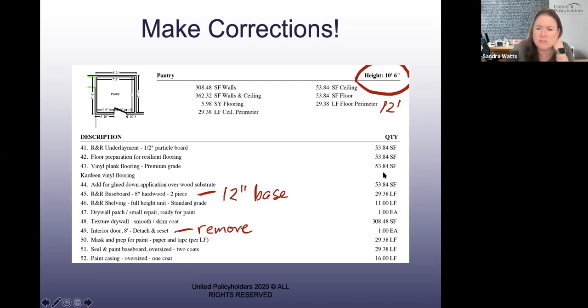Room dimensions in your example are exact finish numbers. So Robert, obviously you're in the building trades. I can tell by your questions about waste and building dimensions. If you look at the measurements here, Robert, the 7'8" is on the inside. This 8'2" is the outside dimension of the room. And Xactimate automatically accounts for the size of the framing lumber that you use. So it adds it on. So it's automatically